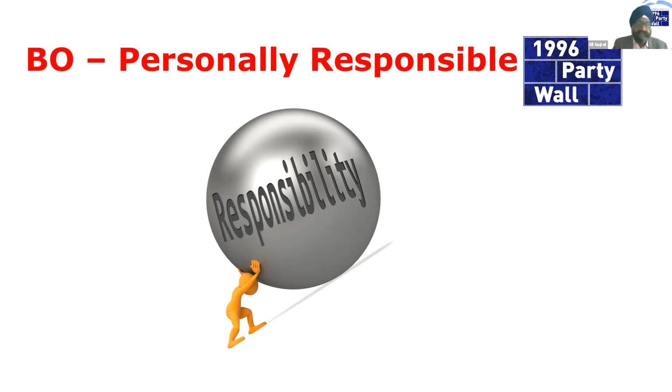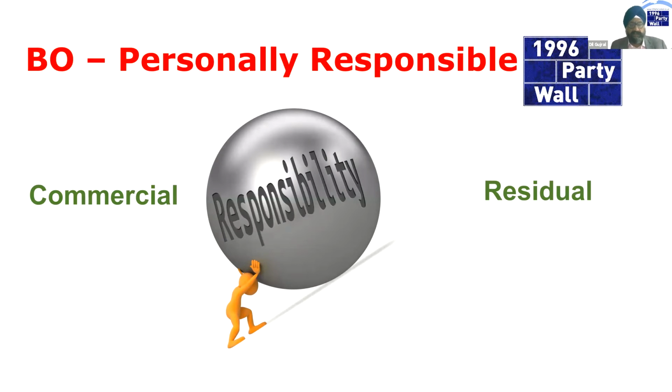You can't delegate this off to an architect or a project manager. The buck will end up coming back to the property owner. So there's a sort of buck stops with the property owner. It applies to all commercial projects and all residential projects, regardless. And like I previously said, all across England and Wales. Okay. On average, in a year, about 1 in 42 properties are affected by the Party Wall Act. So that's the kind of numbers you're looking at, and where you've got property managers, this gives you a gauge of how many notices you'll be receiving, depending on your portfolio.